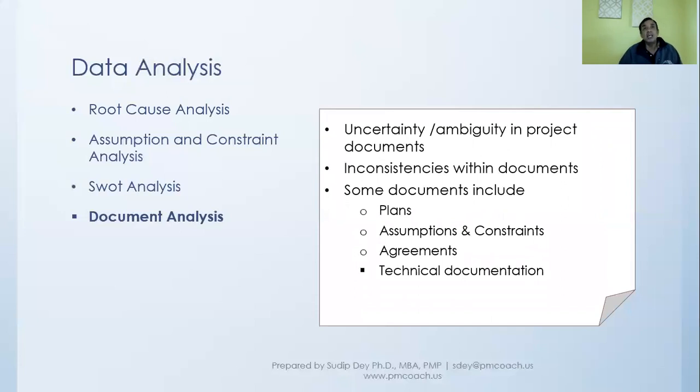When we analyze them, they might surface some risk. For example, in the agreements we have with a vendor, there might be a clause that, when we analyze it, we see could be a problem, or it might be difficult for us to meet, and so that will give rise to risk. So this is how we can go about identifying risk.